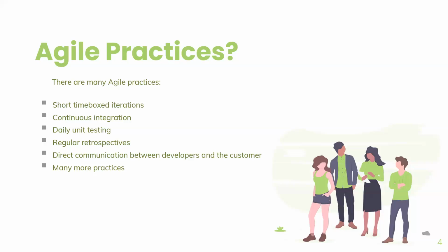Agile says, for example, and we'll get there as well, something called daily stand-ups. Your daily stand-ups are basically your project update meetings, to say what happened yesterday, did you have any issues, and what are your plans for the end of the day. That should not take more than 15 minutes.